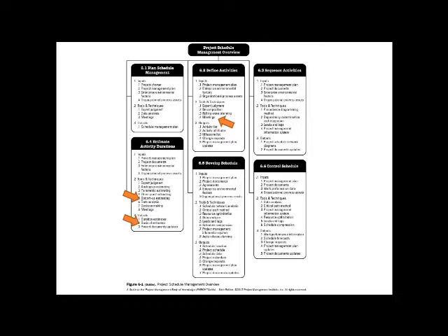So it's very important, emphasizing the fact that whenever you're quoting a number, make sure that you also describe where you got the number from, the range of accuracy, the basis on design, particularly important in Agile, of course, when you are doing this sort of parallel development of design and execution, that whenever you're quoting numbers, you should also be explaining the foundation for those numbers and the relationship between the numbers and the development of the design.